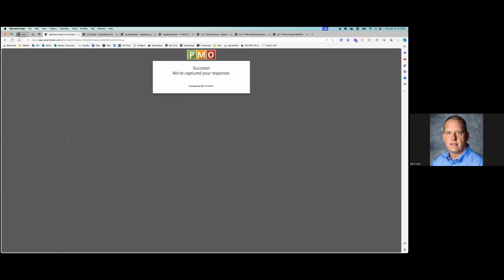I, as the PMO leader, will get an alert in my email and also via Teams saying, hey, somebody submitted a new project. You need to go do something. And really, those are two things. One, I make sure that person is prepared for the PMO meeting that's coming up next, with what they need to do for project activations. We do use PowerPoint slides because it only happens once, and we have some templates that we use to show budget and who's involved and what the purpose of the project and what the deliverables are and all that kind of fun stuff. So I talk to that user, make sure they're good, and then once the project is activated in the PMO.